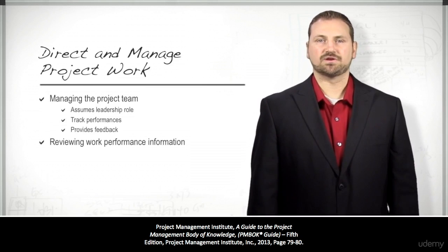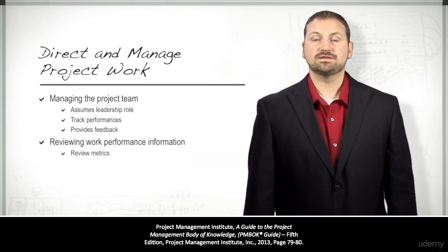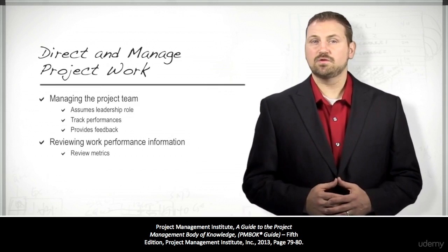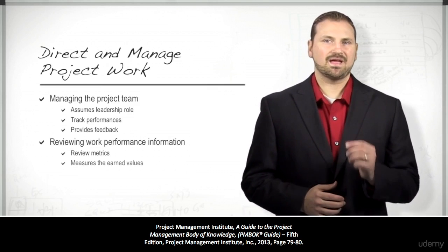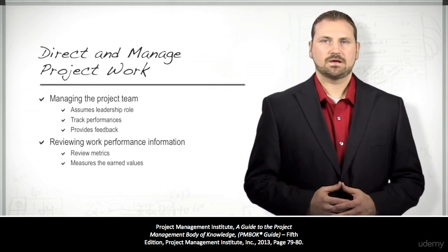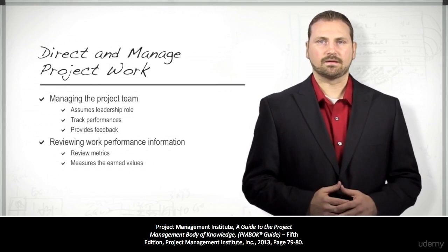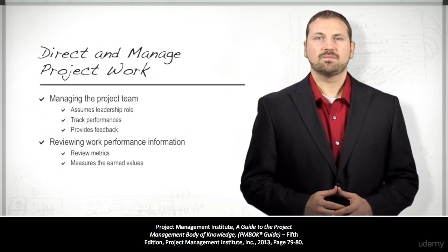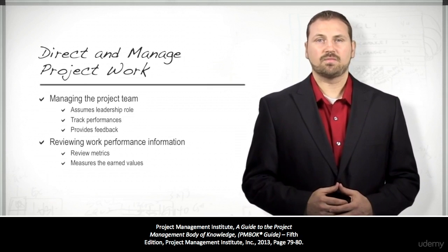Reviewing work performance information. The project manager and project team review metrics that detail project productivity over time. As project activities move towards execution, and within execution, it's essential to measure the earned value of the project deliverables on an ongoing basis. With earned value, all steps in a project earn value as work is completed. The project manager or team member can compare the earned values to planned and actual costs to determine if a project is on schedule and within budget.